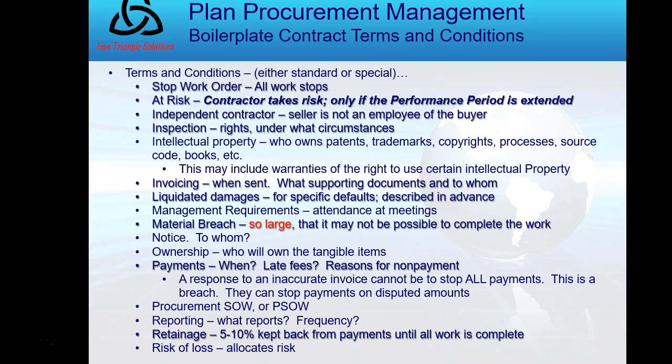Invoicing. I didn't realize I, as the project manager, would want to specify invoicing in my contract. Or what are liquidated damages? Those are damages for specific defaults that you've described in advance. What's a material breach? It's so large that it may not be possible to complete the work. Payments. When are payments made? What are the late fees? What are the reasons for non-payment?